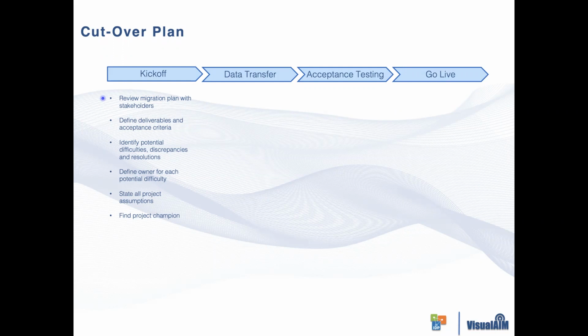That's why also as a part of that review, we clearly want to define with the client what the deliverables and acceptance criteria are for the software, because you could potentially fall into the rabbit hole of basically developing additional or more items as you go along the migration process that perhaps were not part of the initial scope, based on additional things that sort of start to come up as you do the migration process, as plant personnel start to test out the software. So you really want to hone in and clearly define what the deliverables and acceptance criteria are going to be for the migration, such that you don't get to that particular pitfall.